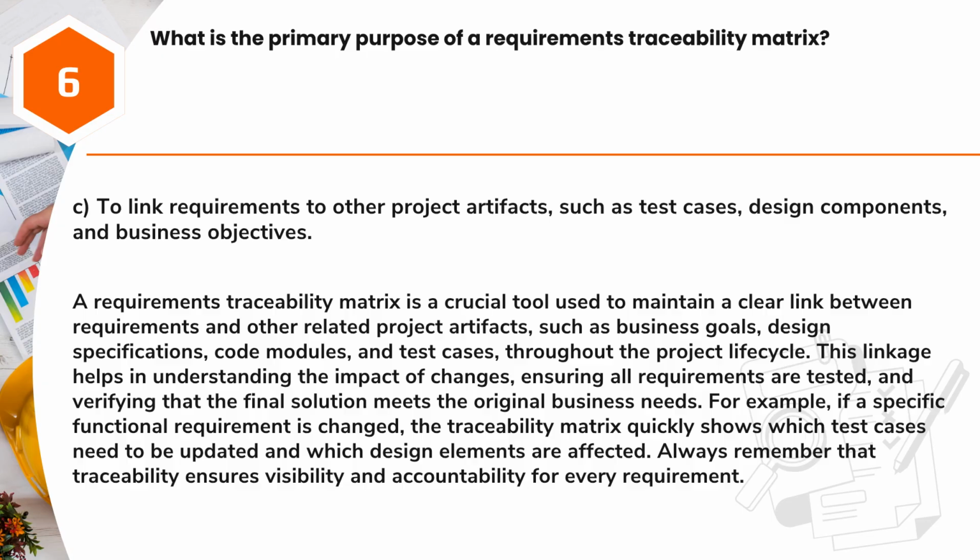For example, if a specific functional requirement is changed, the traceability matrix quickly shows which test cases need to be updated and which design elements are affected. Always remember that traceability ensures visibility and accountability for every requirement.